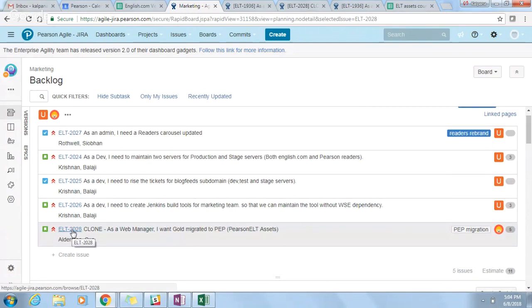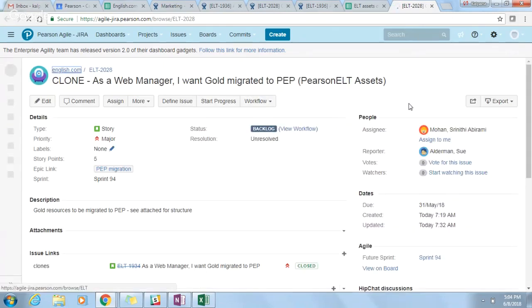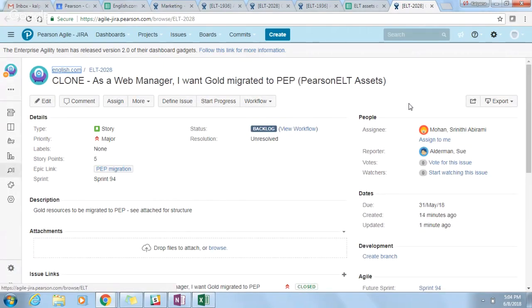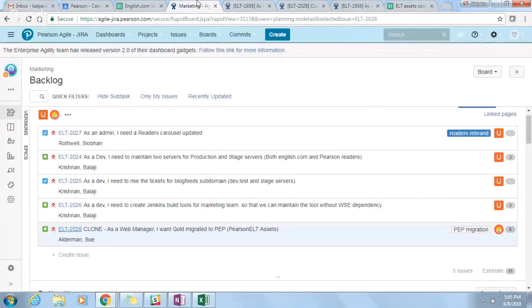So back to the 2028 team, what would be the estimate? For all 3, you can add separate tasks and split the counts of 400. If it is 50 for 1 point, then 8 points. Shall we have 8 points for this story, Sue? Yes, if that's what you need. Is that including QA? Yes, Sue. You can also involve Prabhu in this, if needed. Okay.